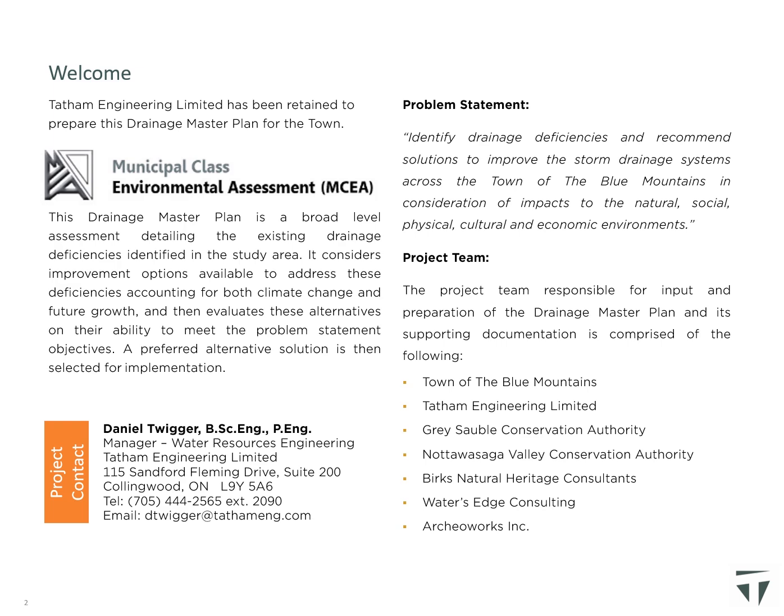Finally, ArchaeoWorks has conducted a Stage 1 archaeological assessment identifying areas of potential archaeological resources in the study area and the need for Stage 2 archaeological assessments as part of the detailed design for each alternative solution considered.